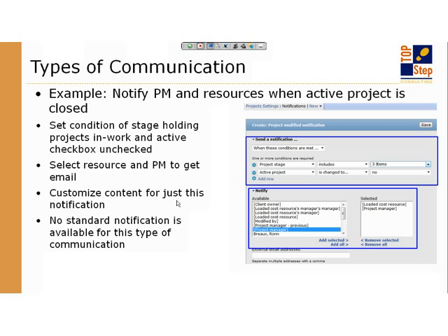In this case, I turned on the project notifications, and I'm creating one for when the project is modified. I set up these conditions that say when the project is in, and the 3 stages I picked were at risk, live, and closed. So those are the 3 project stages where things should be actively worked, or of course closed means the project is no longer active.